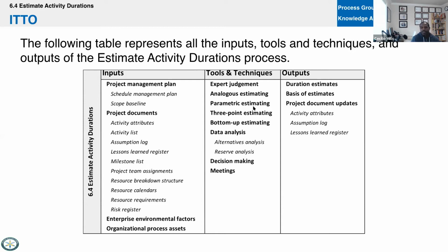All right, EEFs, and we'll look at these estimating techniques, like analogous. You might want to mark this if you have the book: bottom-up is the most accurate method of estimating. The least accurate is analogous. I'm just going to make a note of that.